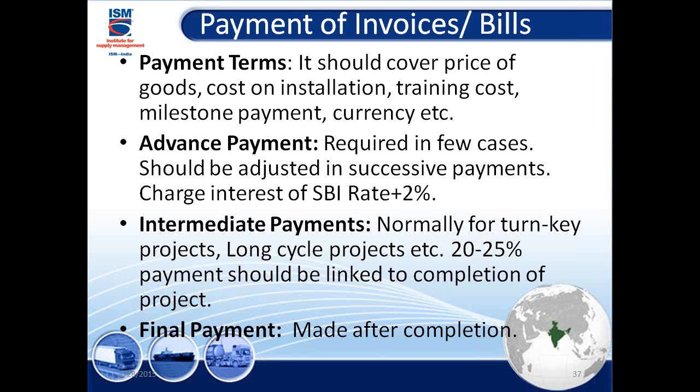So that tomorrow there's no dispute about which exchange rate you're going to follow: which bank's, or the government exchange rate. Or if you're importing goods, say from the US, you will say I will use my bank's exchange rates. So you have to really define whose exchange rates are to be used.